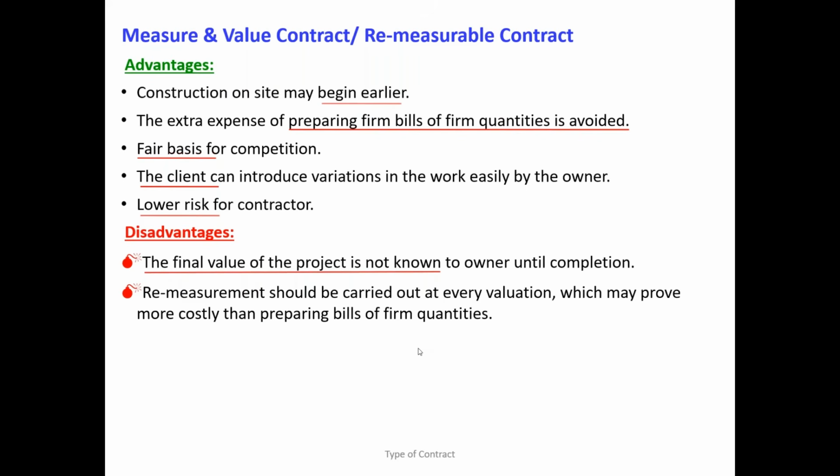Many people, okay, say for example, some people worked under the lump sum contract. They had experience how to do the payment and the variation for a lump sum contract. When these people went to the remeasurable contract, they think that is the right practice, and they will do the same practice under the remeasurable contract. What will happen? This is going to bring unnecessary problems in the project. This is happening in reality, right? The way of doing the payment and variation under the lump sum contract and the remeasurable contracts have absolutely different perspectives. But many people are not aware of that.